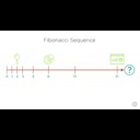Alan adds, there's one more thing I want to make sure everyone understands. Because of the intentionally vague nature of complexity points, what each value represents will be different to each team. For example, a development team of 5 people may complete 25 points in a 2-week sprint, while another development team of 5 people may only complete 13 points in that same 2-week sprint. This doesn't mean that the second team only worked half as hard as the first team. More likely, both teams put forth the same amount of effort, but each team has a different concept of how large a complexity point is.